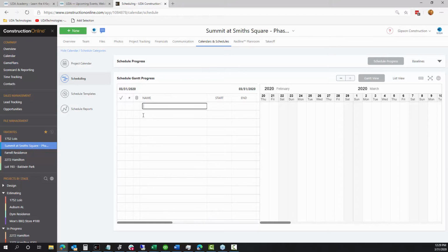The great thing about our scheduling system is that the companies already have every piece of information they need to build their schedules. And that's because it really starts, at least when I recommend building a schedule, with the tasks themselves. The first step is to ignore the start and end dates, to ignore the predecessor relationships, and really start by building out everything that needs to happen in your project from start to finish. And that really begins by entering in different tasks.